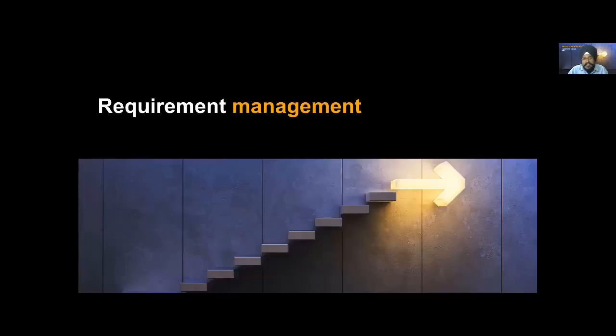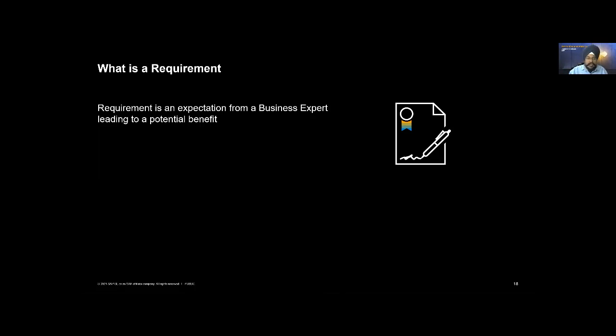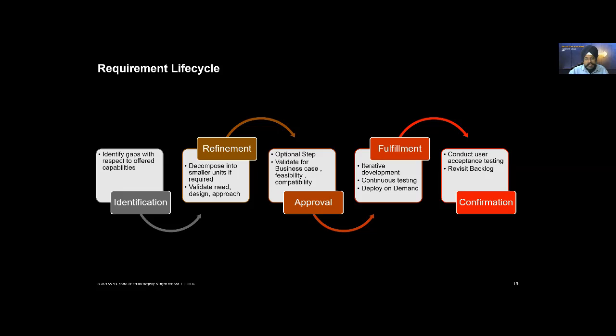Based on your feedback, we introduced this recently - a percentage view. Earlier we had a different visualization, but this is percentage completion. We take the total count of tasks and know the total tasks done by now. That's how we give percentage completion of any phase and even percentage completion of a project, but only from a task perspective. This is important - project is also beyond tasks. Project is also testing, documentation, refinement of use cases in fitness workshops. That's why we make it clear - this is only by tasks. We have this today card on what you should focus today. And we have a dimension called work stream that comes from activate, which tells how tasks are distributed across different cross-functional areas like analytics or extensions. Now let's get to requirement management.